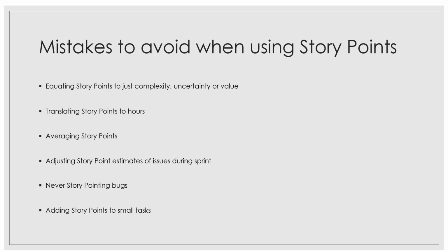When you translate the story points to hours, you stop benefiting from the speed of relative estimation. You start working in hours and risk giving your commitment. It will provide you with a false sense of accuracy as you reduce a story point to a time range of, for example, 10 hours or 15 hours. It will also be more difficult to reach an agreement when you are estimating a requirement together with your team. You will not be able to reach a consensus because each participant will vote based upon the skills they possess that are required to do the job. So it's always better that you have a reference backlog item or a user story based upon which you will estimate all the other user stories, and never translate the story points to hours.